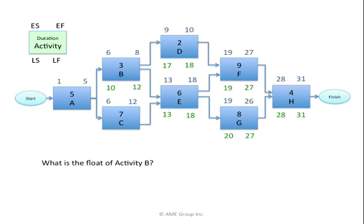Now I ask what's the latest C may finish. E has a late start of day 13, meaning the latest C can finish is day 12. The latest C may start: 12 minus 7 plus 1 equals day 6. For activity A — what's the latest A may finish for B to start by day 10 and C by day 6? I look at the smaller number, day 6. The latest A may finish is day 5. With A being 5 days long, 5 minus 5 plus 1 equals day 1 as the latest A may start. To answer the question about float of B, I only needed to go back as far as B.